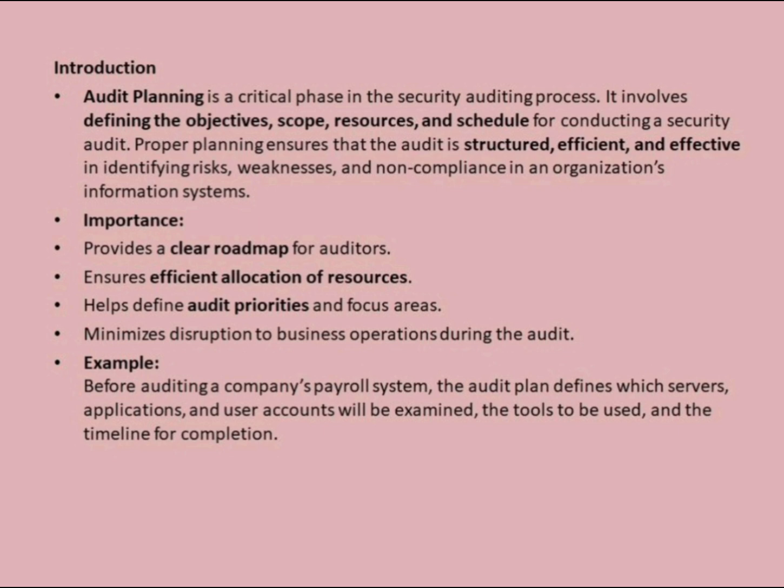Example scenario: before auditing a company's payroll system, the audit plan specifies scope: servers, payroll applications, user accounts, and database logs. Objectives: verify access controls, detect unauthorized changes, and ensure compliance with financial regulations. Resources: IT audit team, database analysts, auditing tools like Nessus and Wireshark. Timeline: 2 weeks for data collection, analysis, and reporting. By following this plan, auditors conduct a structured and efficient audit, ensuring that critical risks are identified without disrupting payroll operations.